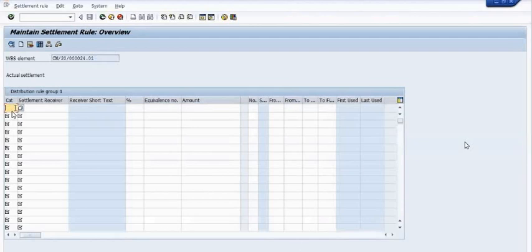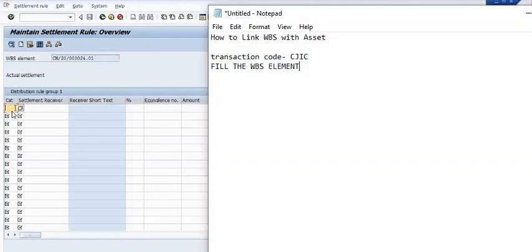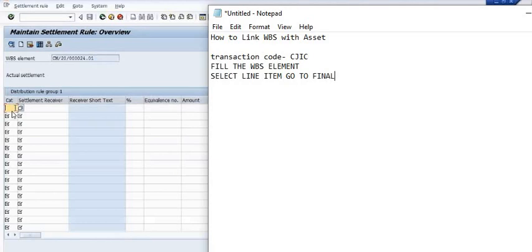On the final settlement, you need to fill the settlement receiver. Here you need to select the line item and go to final settlement, then fill the settlement receiver.